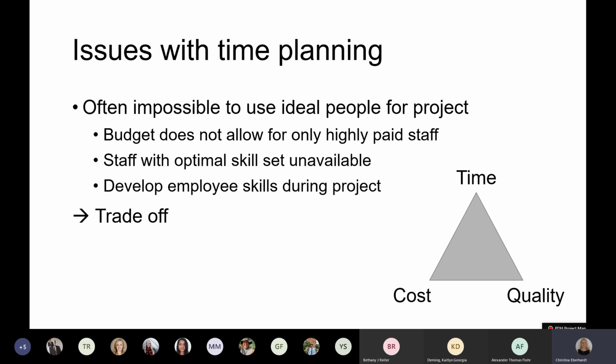Sometimes staff might just be gone for a month, and all of the team might be gone for a month. And it is important to have those things presented when planning out the timeline, and to also discuss with employees beforehand what their plans are, so we can take that into account.